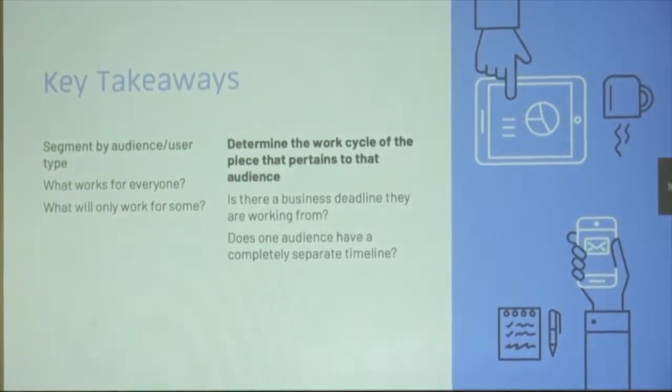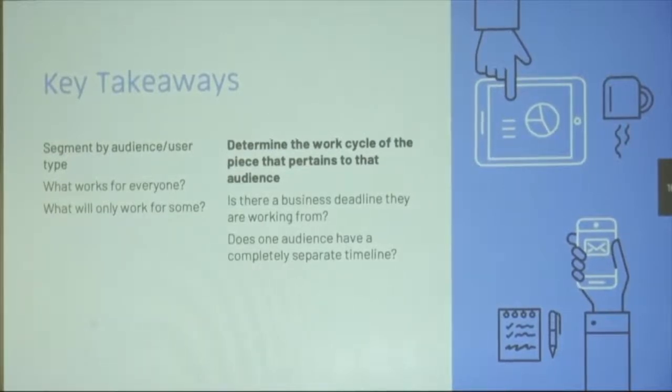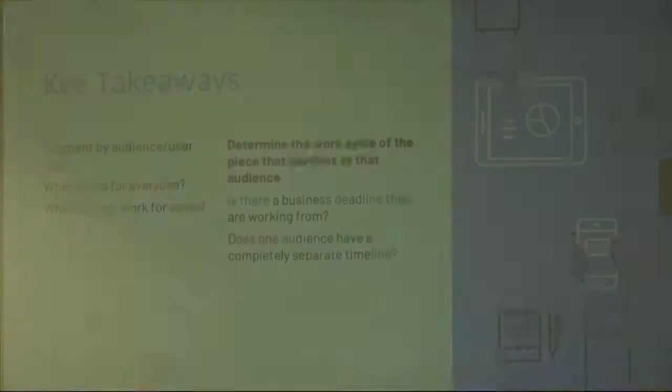And we found out that some audiences had a totally separate timeline, and so that started to allow us to scope things, to chunk things, and to start getting a clearer picture of where we needed to go. Next slide. Using this process map, you can see there were some really obvious points where there was a pause and then something else happened, and then a pause and something else happened. And a lot of things we just said, this is simply out of scope. And so this started us, just being able to more clearly define and see what the current landscape is.